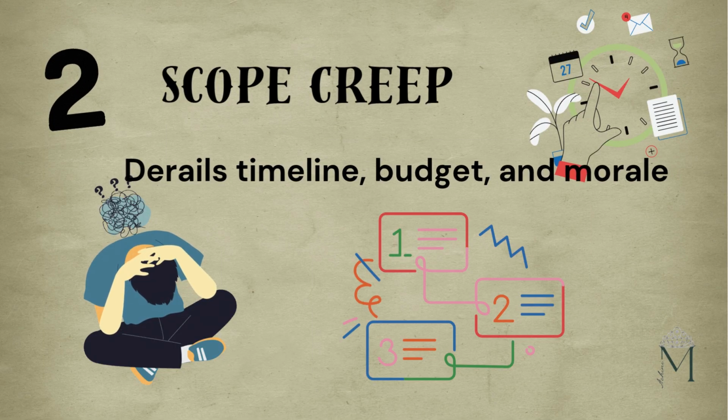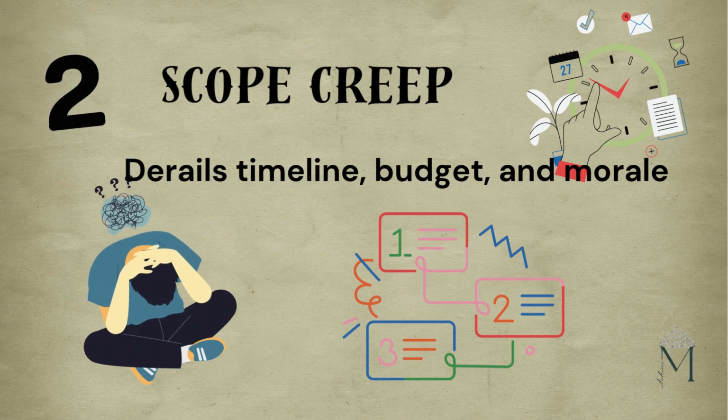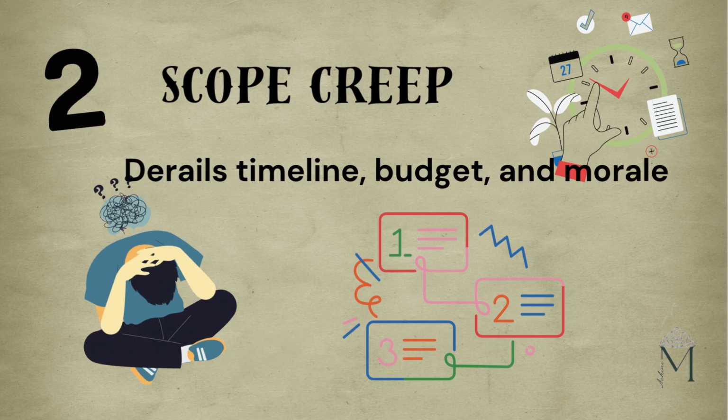Scope creep happens when the project scope expands beyond what was originally agreed upon without proper adjustment in time, cost, or resources. For example, take a government website revamp project that started with the scope to update the homepage and news portal, and halfway through, departments began requesting new features like online payment, GIS mapping, recruitment modules, etc. All were added without extra time or budget. The result? Project overran by 4 months and went 60% over budget.